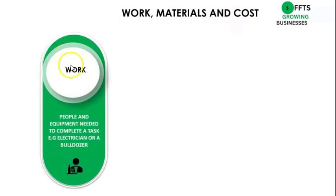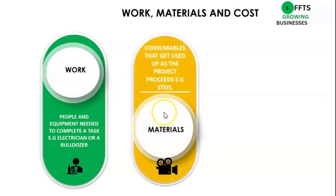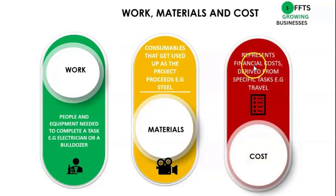So we are going to be looking at work — people and equipment needed to complete a task. So electrician and bulldozer are work resources. Materials are consumables that get used up as the project proceeds, for example, steel. Costs represent financial costs derived from specific tasks, for example, travel.